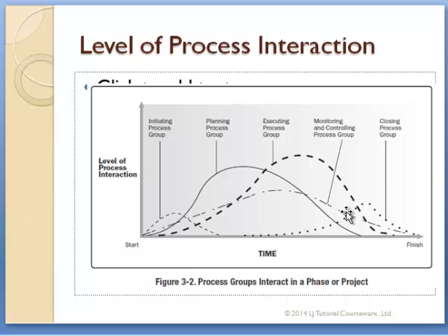Then also closing starts somewhere around the middle to the end. Now closing, you ask, what are we closing here? You'll find out as you go. You would want to close out some deliverables. Maybe we have to build a house. You can break down the project into various deliverables: foundation, lintel, and the rest. If you're done with the foundation, we can close that particular deliverable. So that's why it starts somewhere.